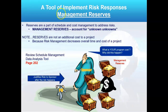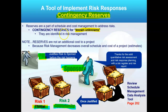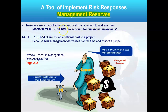There is another type called management reserve. So there are only two types of reserves: contingency reserves, which the project manager owns because you've identified the risks and planned for them, and management reserves. Management reserves are a little different — they're for unknown unknowns. It means we didn't identify the risk and we didn't see it coming.